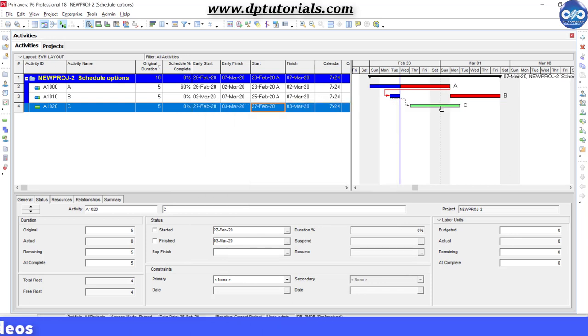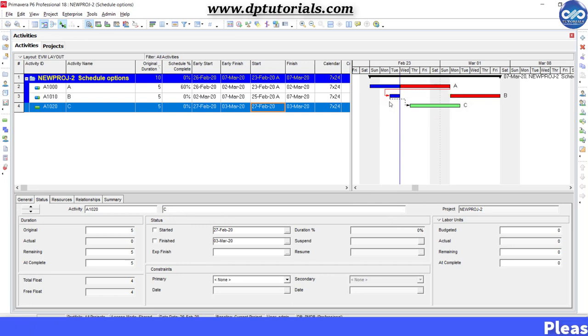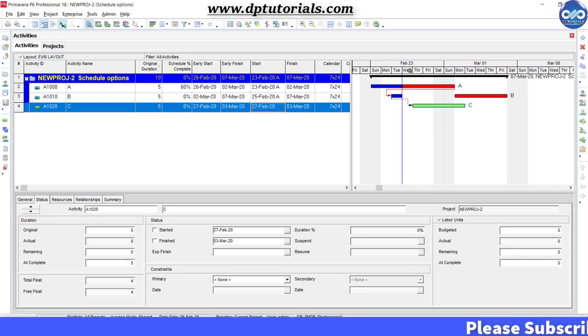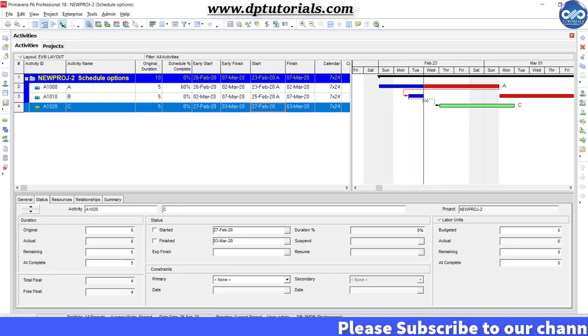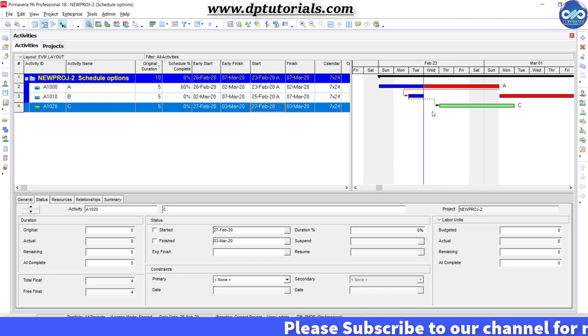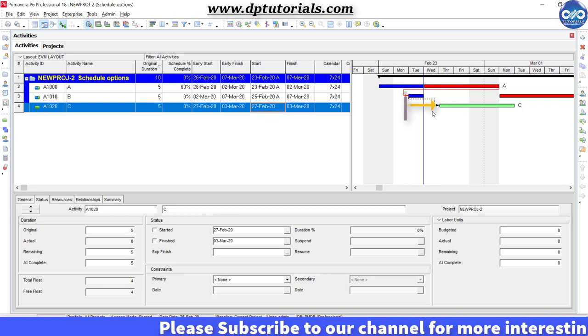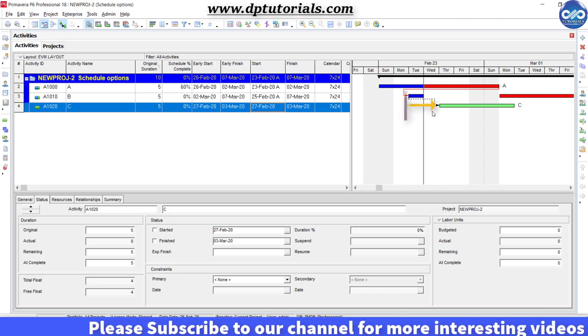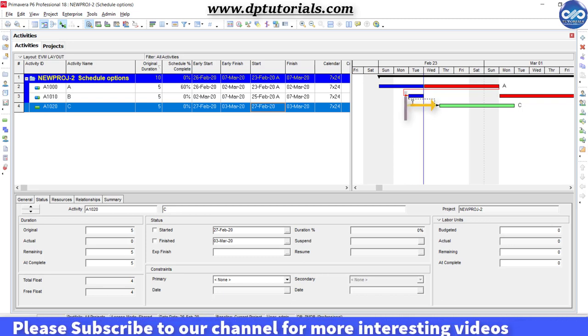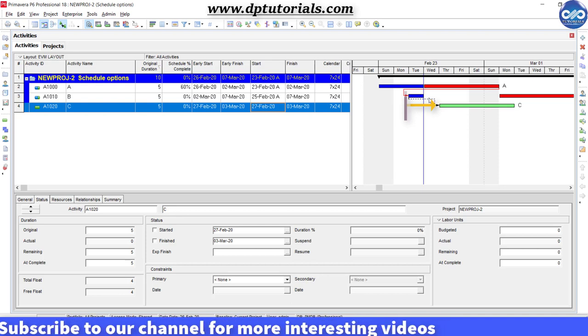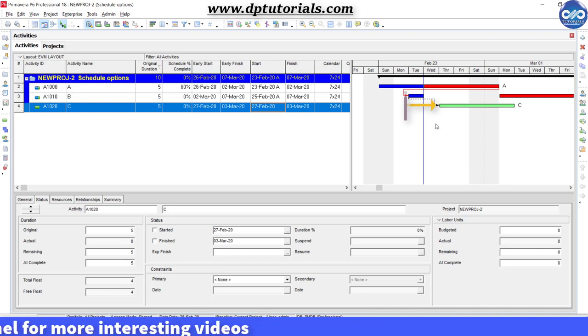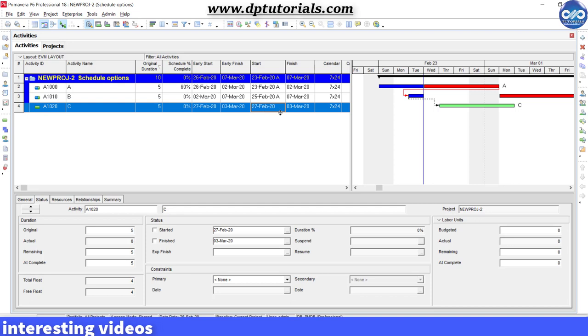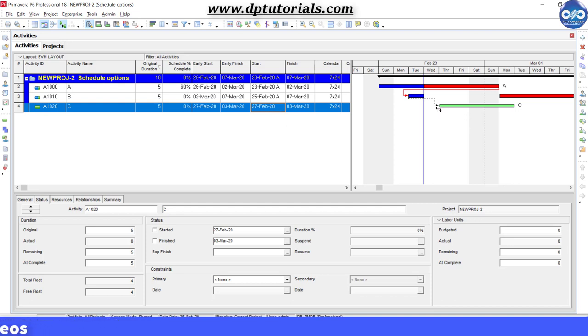In this case, the lag duration is calculated from actual start date of activity B. The lag is consumed on Tuesday and Wednesday because the activity has started on Tuesday. Therefore, the start date of activity C will be Thursday, that is 27th February 2020, which is much earlier than our previous date of the early start option.